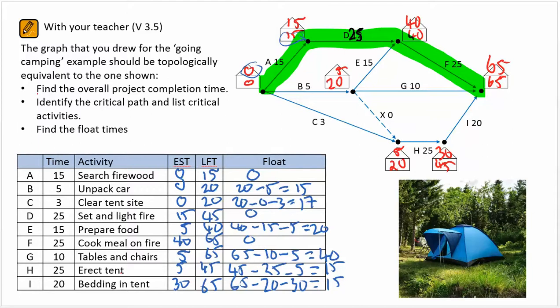The key points, find the critical path. Enter the earliest start times as you go, obviously. Latest finishing times, by definition, the same. Then we reverse the process and scan backwards in order to calculate the latest finishing times.